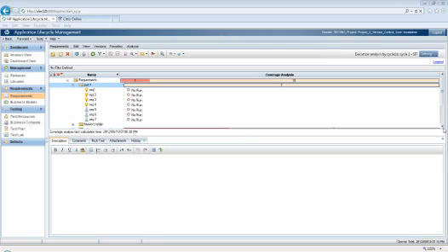Now normally, what does retesting and regression testing mean? It means you have to retest something that was modified. In other words, if you modify requirement 1, so you found a bug for requirement 1, but requirement 1 also ripples into requirement number 10, you would have to test both requirements as part of your retesting and regression testing. And for that, you would need to employ this impact analysis, because otherwise you wouldn't know that requirement 1 links to requirement 10.